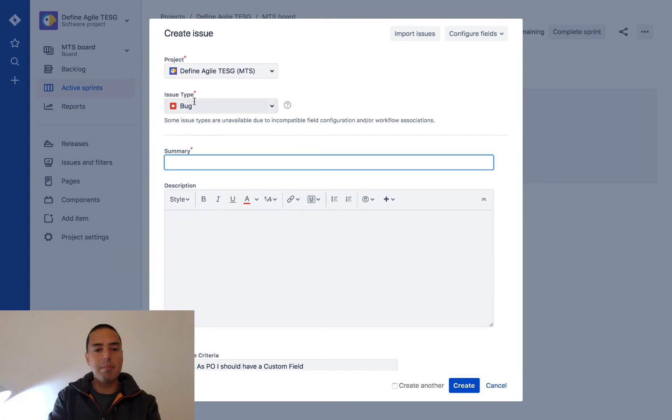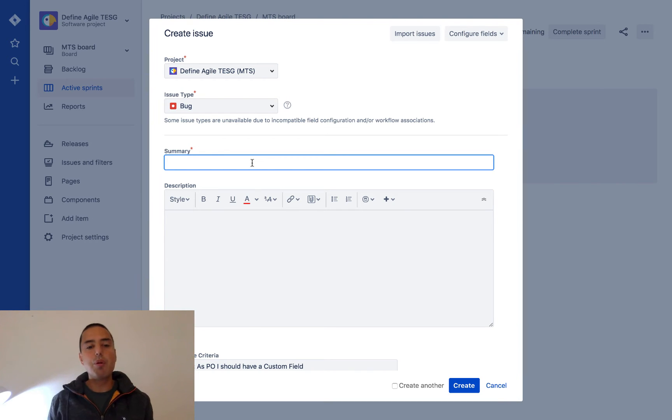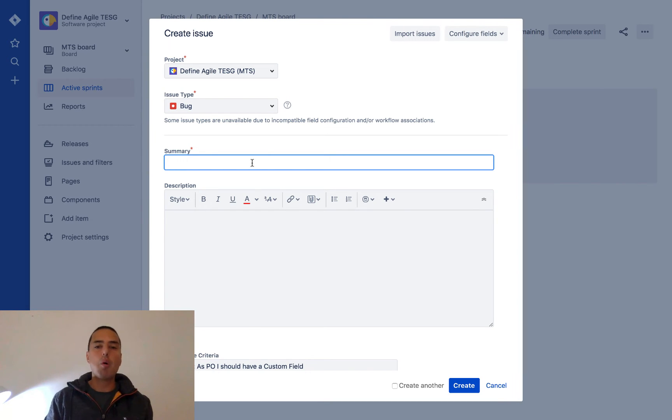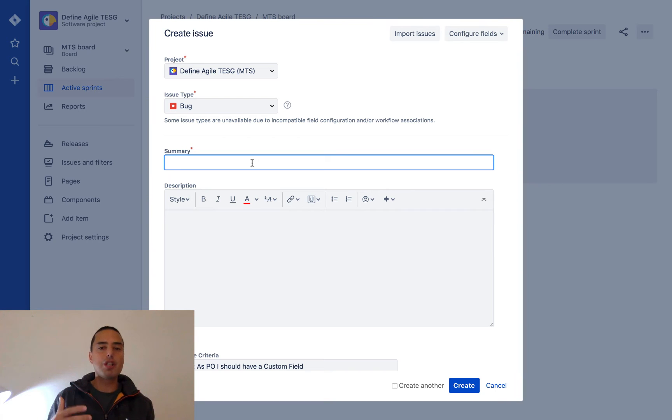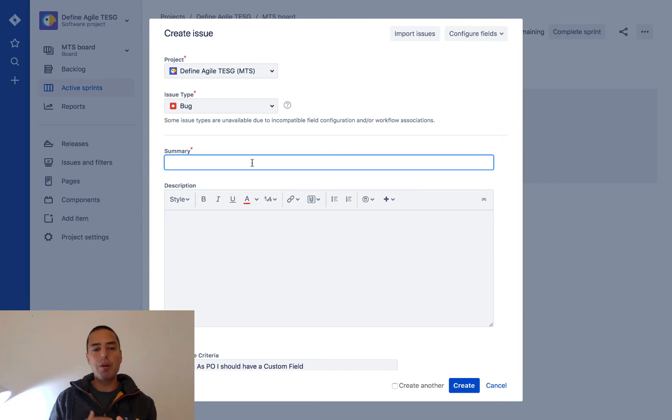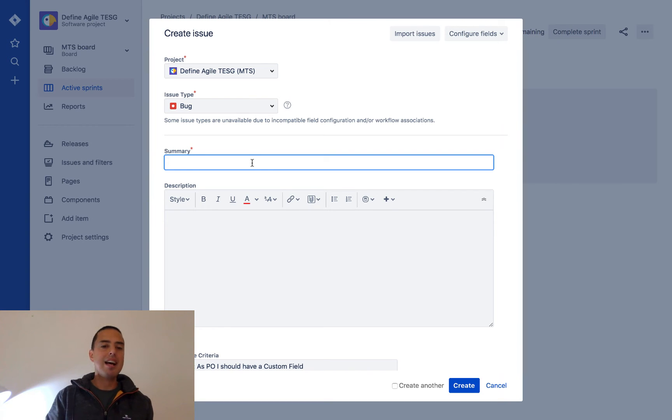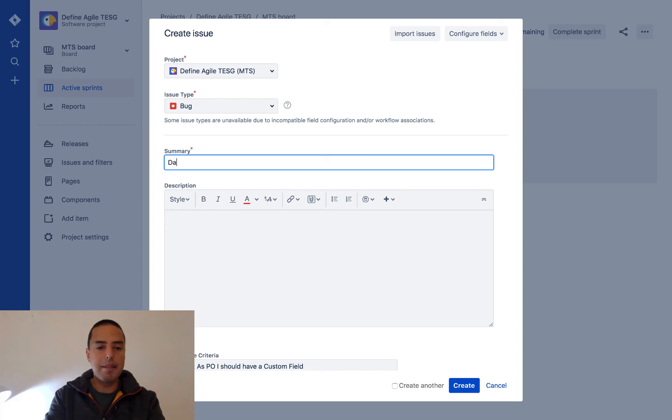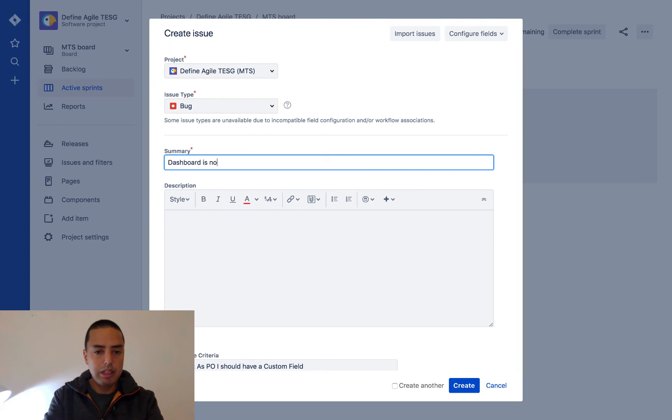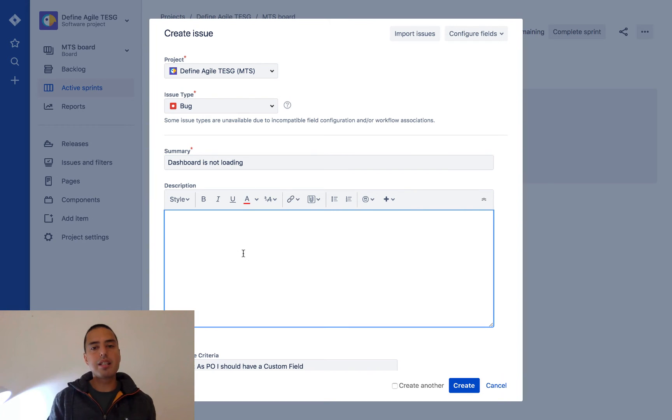about. Very short, at a glance, so when we look at the board or backlog we can differentiate that bug from others. Let's say 'dashboard is not loading'. Then in description we provide more thorough information, for example steps to reproduce, information for stakeholders, or many other things